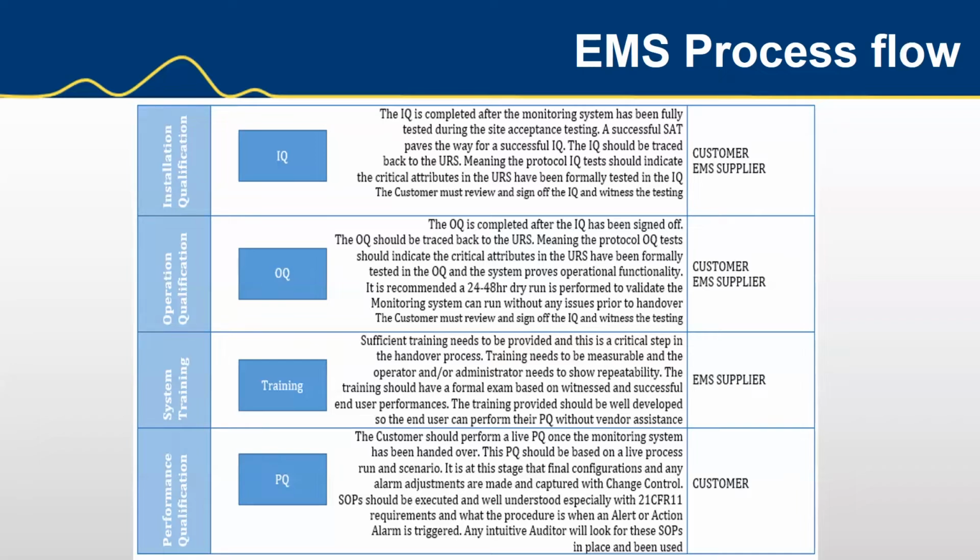But getting on, after the system has been successfully IQ'd and OQ'd, training is really important for the whole department. And please don't skimp on training. For a system like this, you need a lot of training, particularly if you're going to use it at a high level like an administrator. Operators, you can probably get by with a day's training, maybe 4 to 8 hours. Systems aren't that difficult, particularly with operator lockout. They just give them the basics to do: start, stop the system, acknowledge an alarm if you want to have your operators doing that, or you can shift that to somebody that's kind of like middle management.